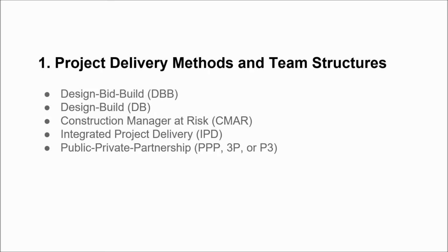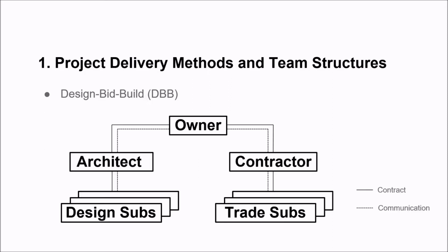We will focus on the first two, design bid build and design build. Design bid build is the traditional means of delivering a construction project. DBB contracts are typically awarded to the lowest qualified bidder. In theory, DBB delivers a low-cost and high-quality project, but as the contractor is removed from the design process, it has a higher potential for constructability issues to be discovered late in the process.